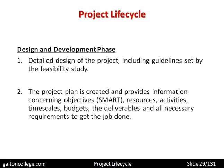A project plan is created providing information concerning objectives — using SMART objectives — as well as resources, activities, timescale, budgets, and deliverables: all necessary requirements to get the job done. The project plan is a detailed document showing what resources are needed, what activities will be undertaken, the timescale, when it will be produced, the budgets, and the outcomes. The project manager will be held to account against that document.